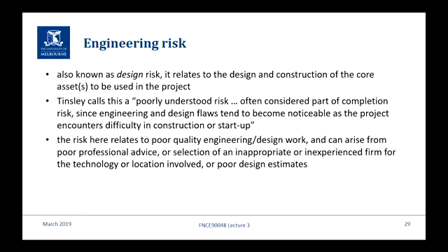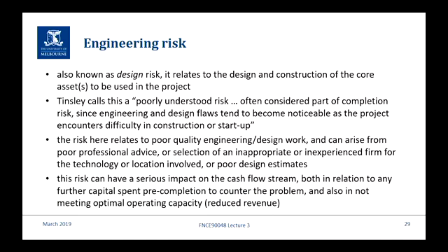An example that I often give is when you're drilling for offshore oil and you have to construct oil platforms, the platforms that you construct off northwestern Australia in a tropical zone are quite different from the platforms that you construct in the North Sea, which is subject to freezing in winter. So if you're a really good platform constructor in Australia and they send you up to do the North Sea, you've got to take into account what the differences are because they're going to have a bearing, or poor estimates.